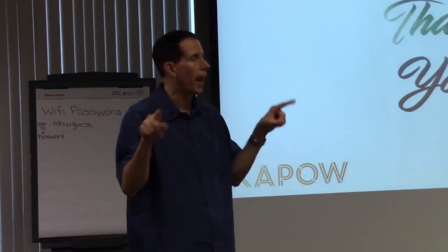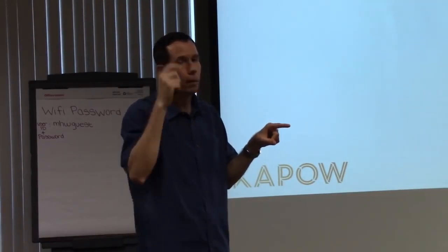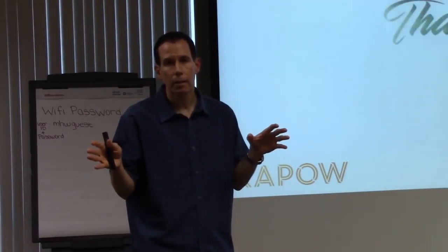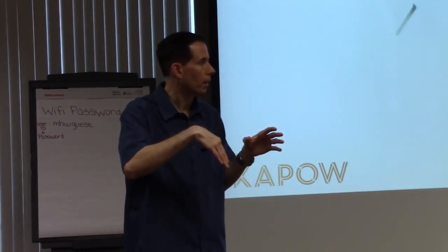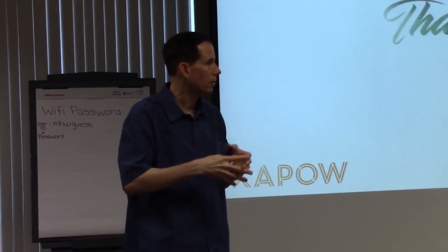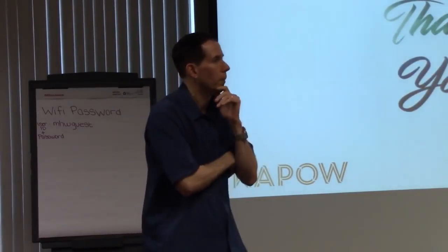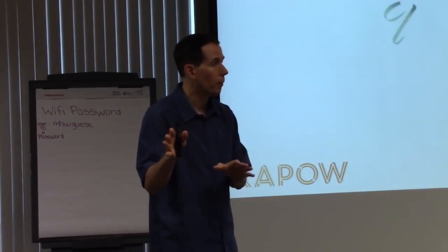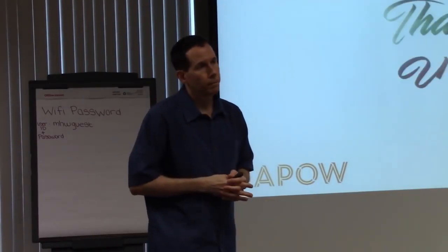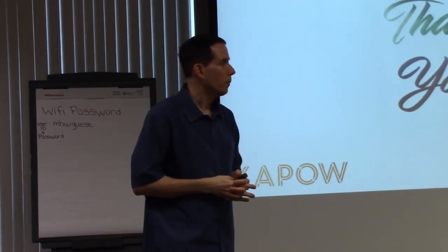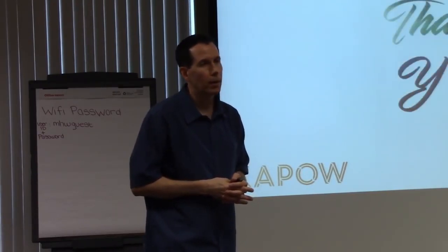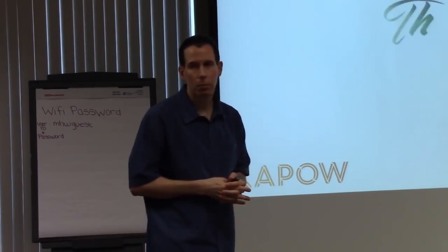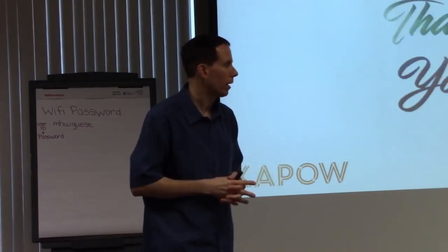Then we don't get left hanging in the middle of something where we didn't get through all of our design thinking. Uh-oh. And then there's another requirement that comes in. Somebody changed their mind and everything. So it kind of prevented that. And so that's why I stretched it out a little bit farther. So it gave me a little bit more runway. I didn't want to go to 3 weeks or 4 weeks. Well, it causes a lot of anxiety for people that are coming off of a 1 week sprint, for one. But I think the 2 week just seems to work just right for what that company was doing.